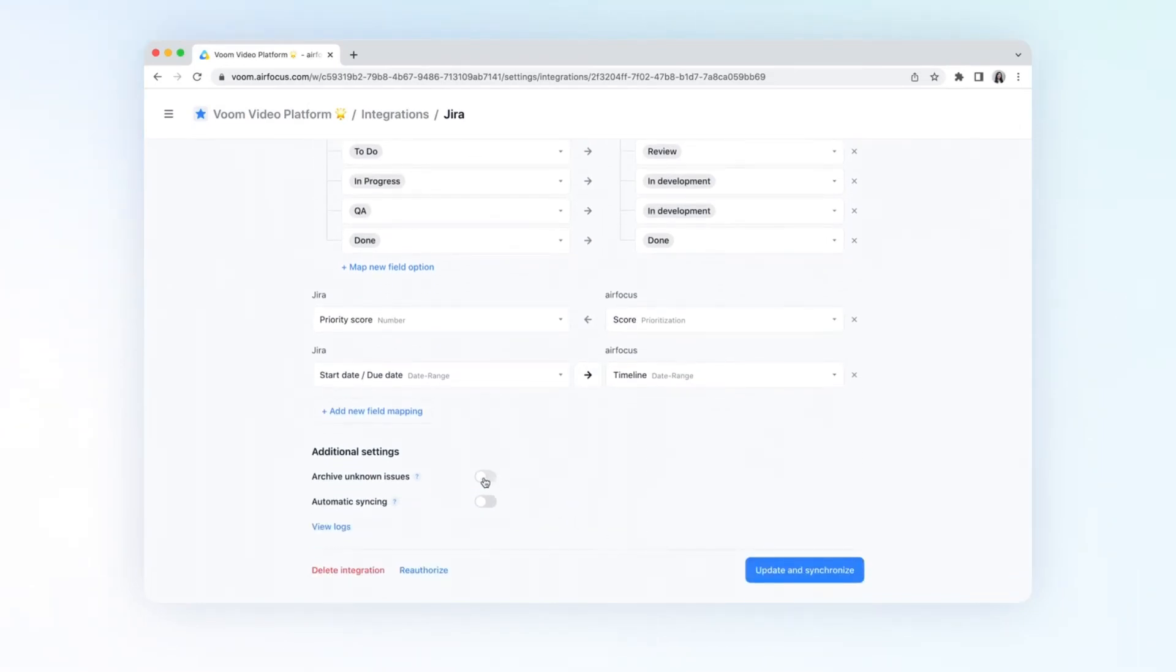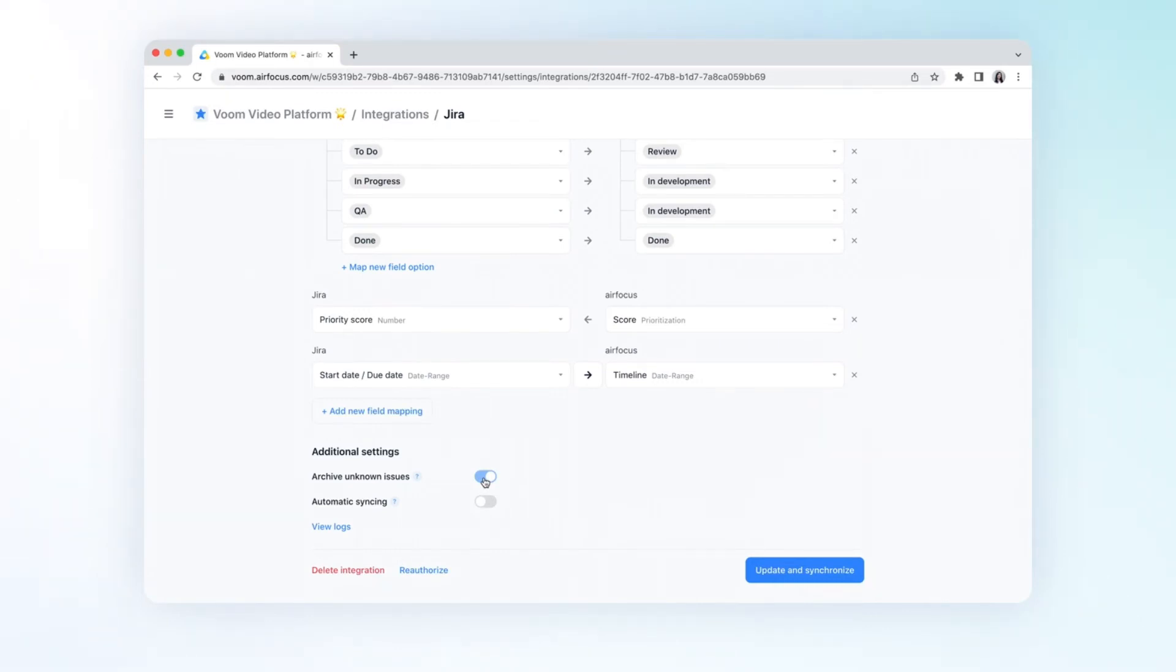When archive unknown issues is enabled, then previously imported issues will be archived in AirFocus if they are not present in Jira or do not match the Jira issue filter anymore.